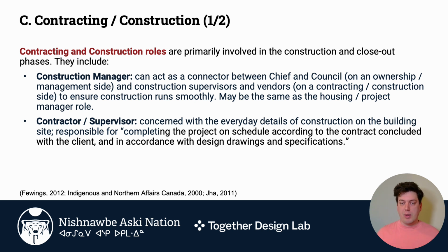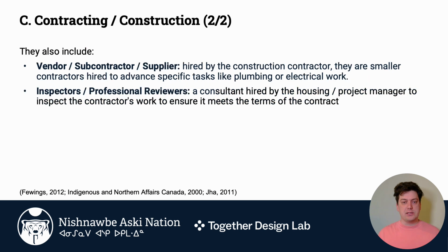So they're responsible for putting up the building and ensuring that the building that goes up remains accurate to the drawings and specifications while also remaining aligned with the schedule. But their focus is really limited here to the construction of the building. And so while it may sound like some of those responsibilities overlap with the project management responsibilities, they're actually quite different in scope.